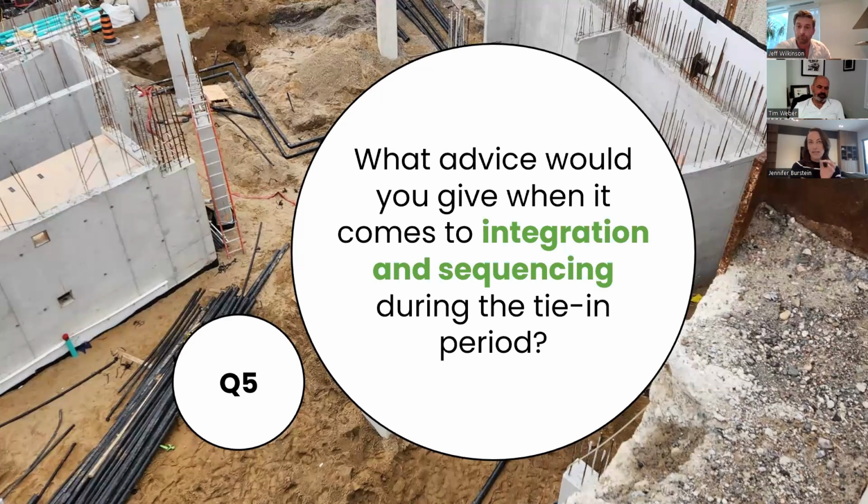It's one of the biggest key points that we focus on at the beginning of the design stage: the geodetic elevation of the lowest level of foundation. When Diverso is doing their vertical drilling, they need to cut and cap those pipes, right, in order to expose them so that they can do the horizontal tie-ins. And if those are out of level to where that foundation level ends up being, it could be more problematic.